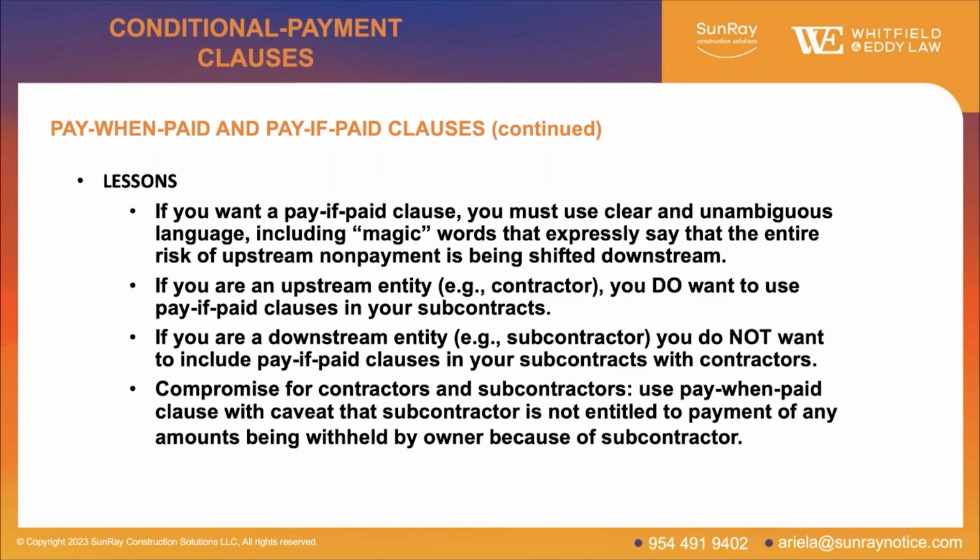So the lesson, if you want a pay if paid clause as a contractor, you need to use clear and unambiguous language. And I would suggest using what I call magic words, specifically say in the clause that the entire risk of non-payment by the owner is shifted to the subcontractor. Make it clear. And if you do that, then at least you won't get into this issue of whether it's a pay when paid clause or pay if paid.